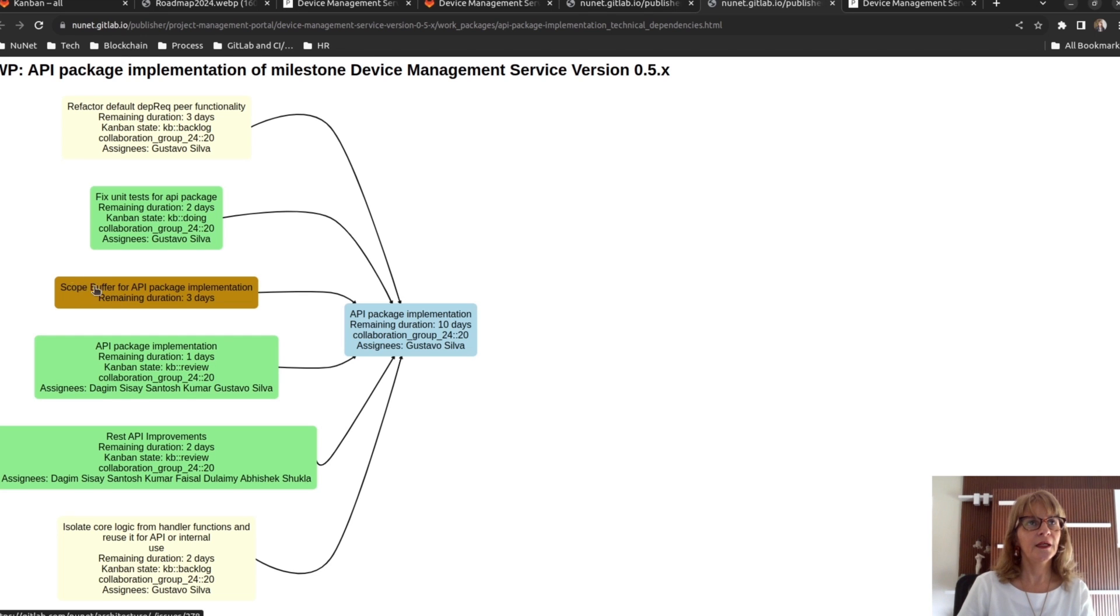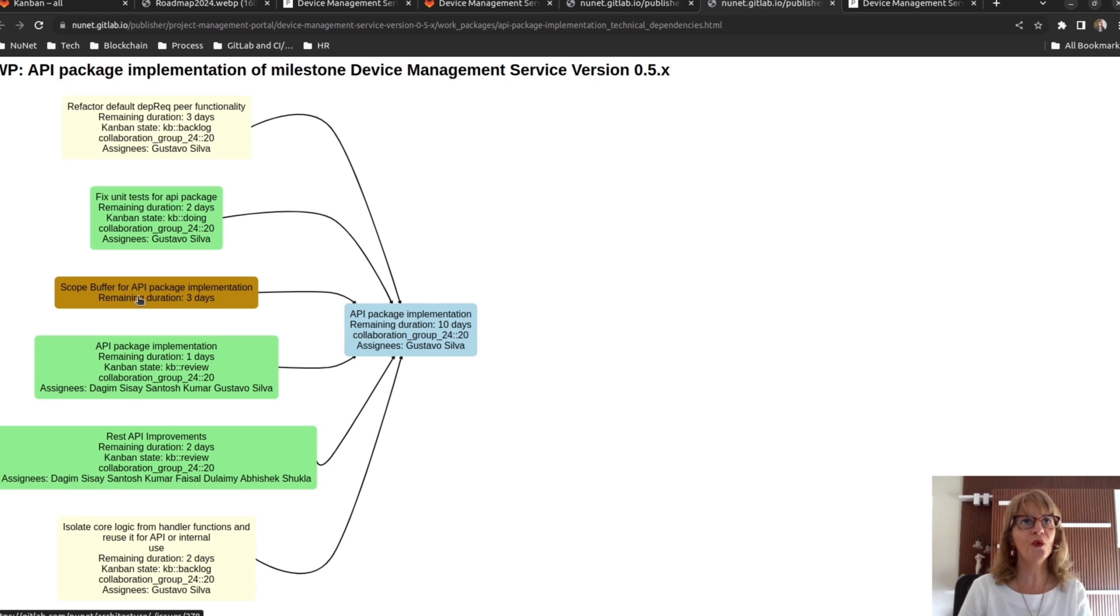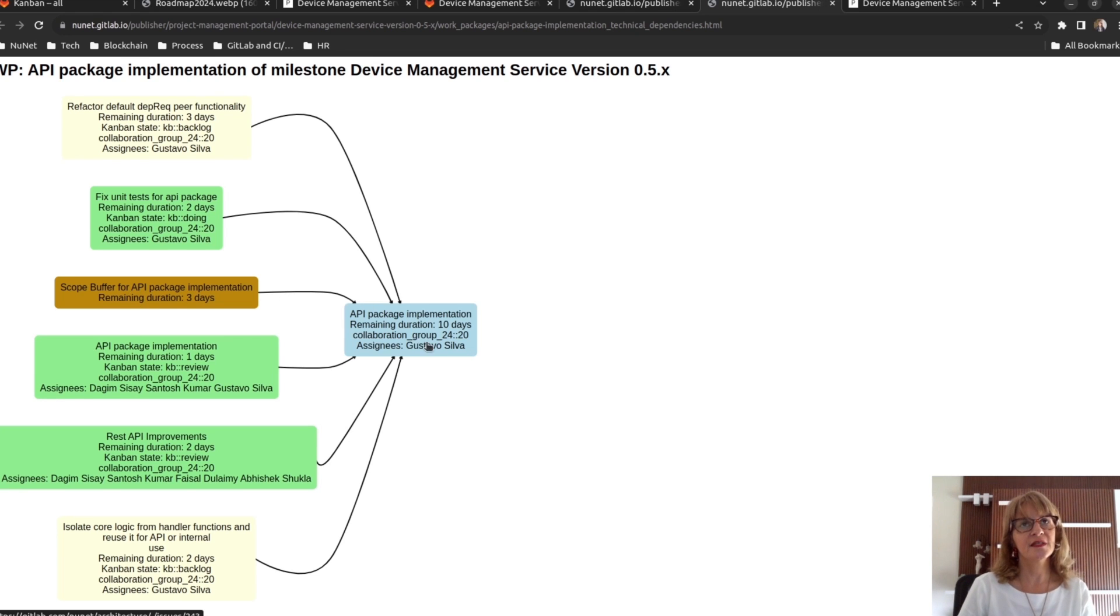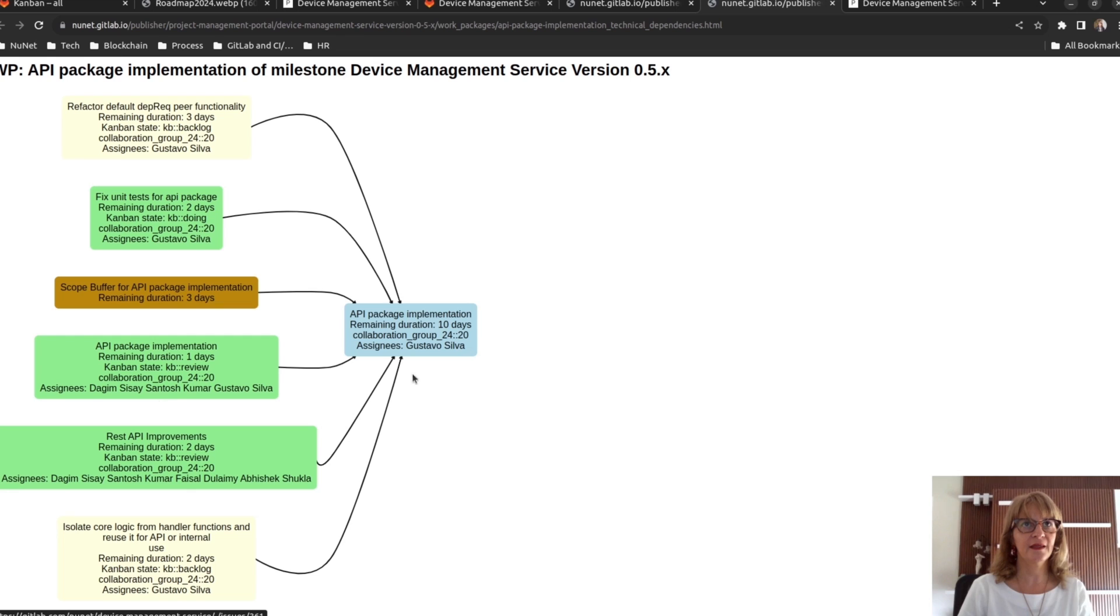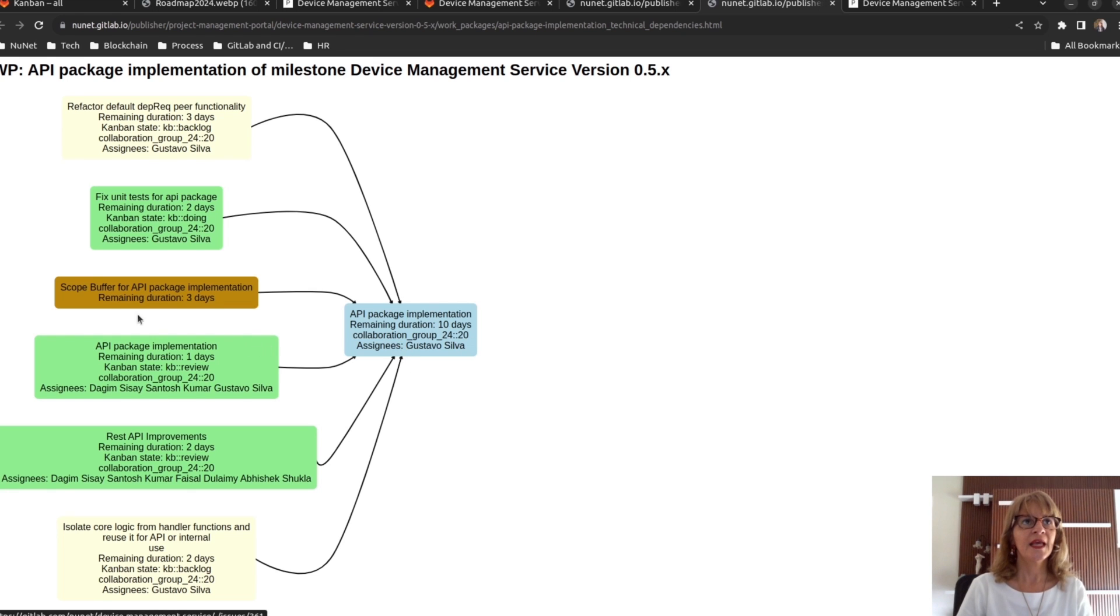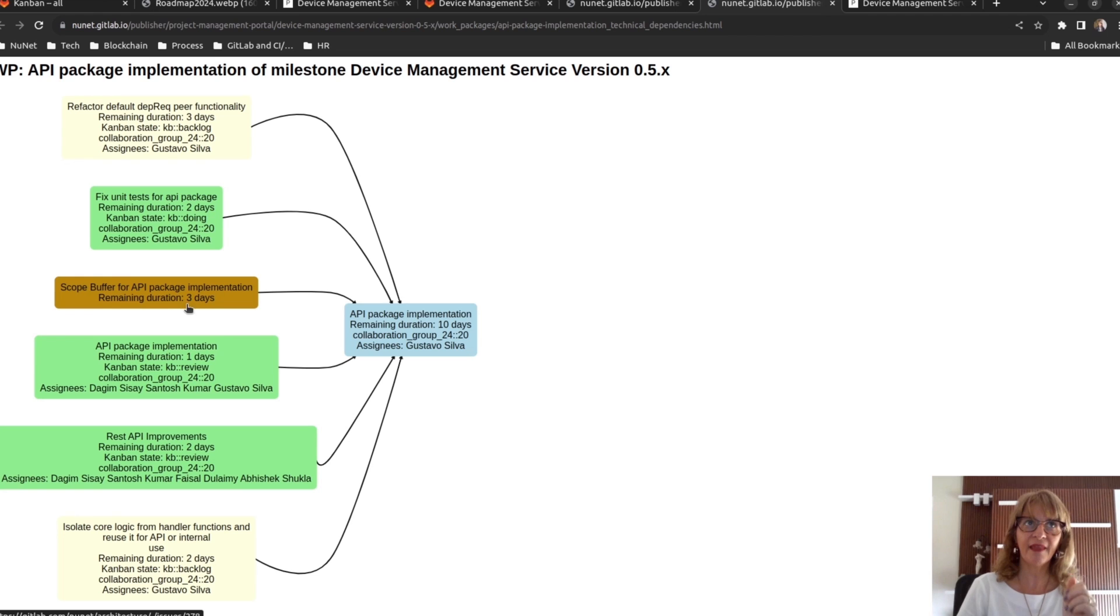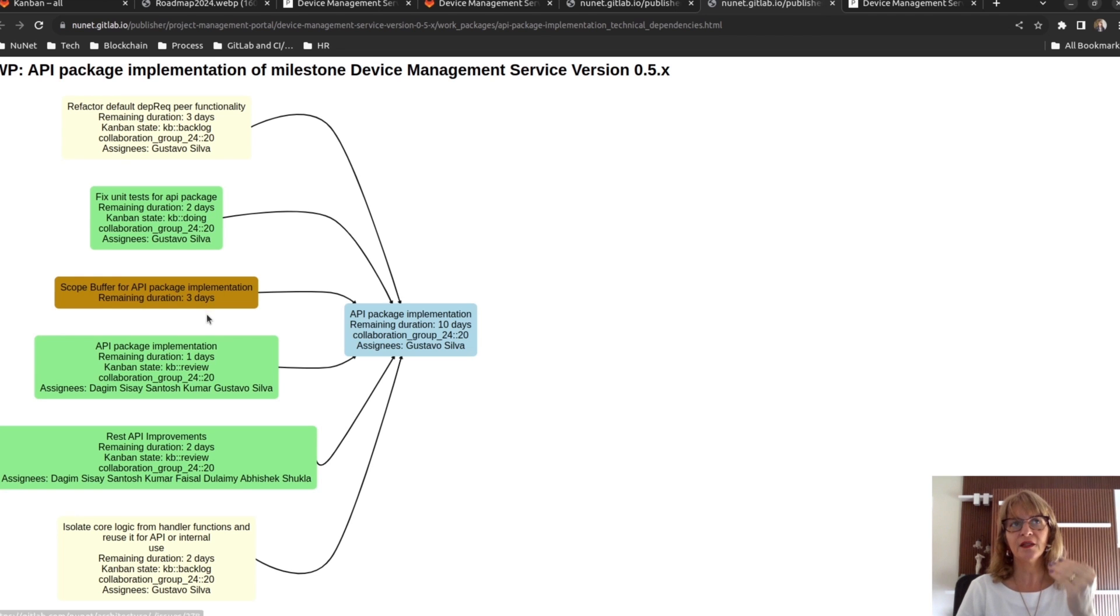The scope buffer is created to deal with uncertainty. For instance, if we need to create another task inside this work package, here in the scope buffer, we are saving days. So, if we need to create a new task, we use these days for implementing that task.